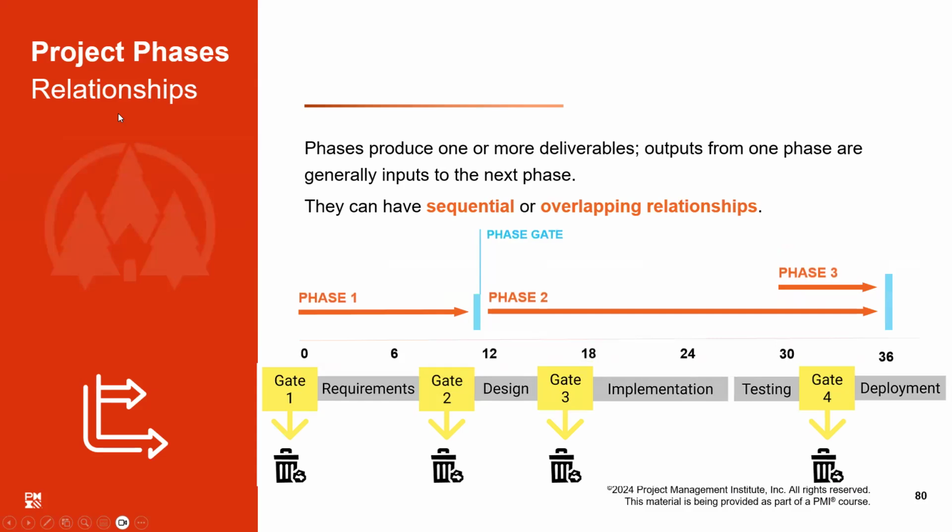Okay, this is just explaining the various phases of the project, right? Like in a predictive project, we have phases. When a phase ends, the next phase cannot be started immediately. The project board has to come in, inspect what we have done, and then they will allow us to move on. Either they will allow us, or they can send us back, or they can abnormally culminate the project.